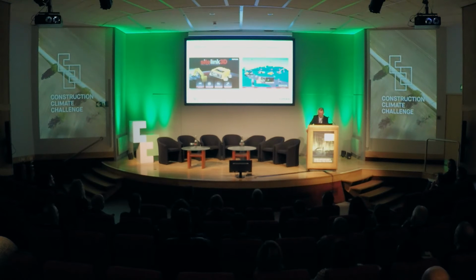Instead of surveyors driving out to measure the ground for progress volume surveys, those volumes of material moved by the machine and other production info gets reported in real time to a server for management to access to see actual progress against planned. It used to be said that you cannot manage what you do not measure. However, we are now encouraged to say you cannot manage in real time what you do not measure in real time. All the data is available to make construction more productive, so that people do not have to drive out into the field and spend time collecting the data as they did before.